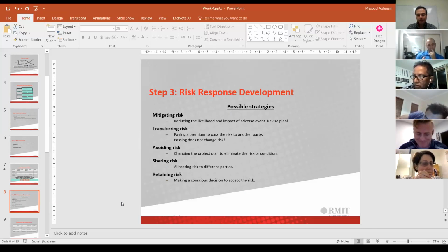For example, you will have a 5% penalty if you delay in the project, isn't it? Yep. So how are you going to answer to that risk, and to the risk of losing a portion of your contract? Maybe we have to have a back-to-back contract with a supplier with the same condition. Okay. This would be a way of transferring that risk.